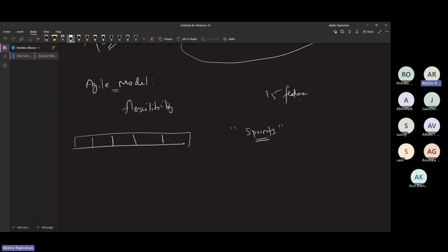I told you my application has 15 features, right? I'm not going to wait until all of these are completed. So what I did here, I split my code into small parts. For example, voice call, this is one part. Video call, another part. Sharing documents, one part. Sending photos, another part. It's like I'm breaking my process.